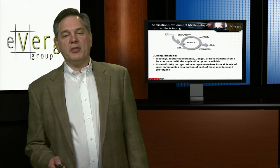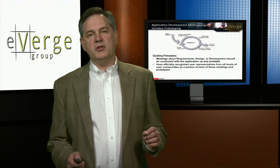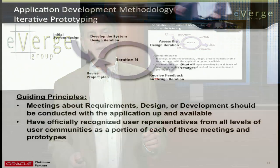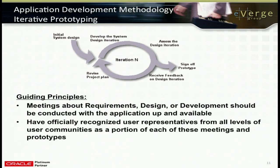Another key piece is knowledge transfer — enabling that there are no surprises at the end of the project. Our clients must have knowledge transferred to them throughout the project so they're ready to be self-sustaining as they go live. One important feature of Precision Fit mentioned in that last diagram is prototyping — what we call iterative prototyping. Once you have a design down, you develop some of it, show it to the customer, get their feedback, assess it, incorporate it, and do this continually through a loop until the application is ready to be accepted.